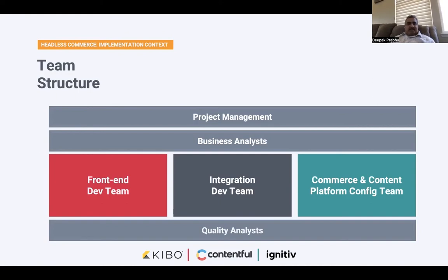If your front-end framework enables the use of what we call micro components, that is, you further break down the storefront into smaller reusable components, there's a possibility of better efficiencies in having an integrated front end and integration team by specific micro functionality. So you can have a team that works on the navigation pages, a team that works on the cart functionality, and a team that works on the search functionality. Each of these teams can be independent, and they will deliver things in a manner that will come together cohesively at the CI/CD layer to build up the final storefront.